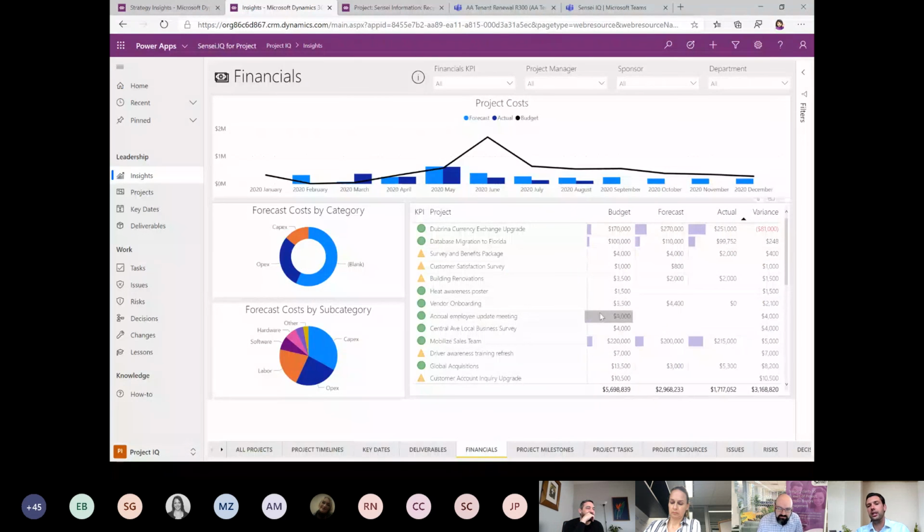If we set a budget either in the finance tool or in the project tool, we definitely want to forecast in the project side, but often we want to see the actuals coming in from that finance tool, which is a single source of truth for actual dollars. It's where invoices hit and we see the accurate actuals to date. So we often bring that information into Power BI.